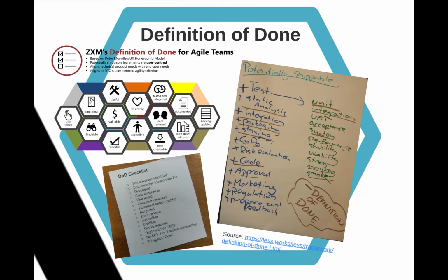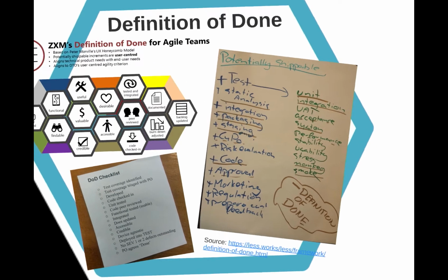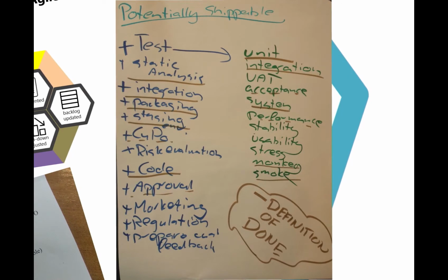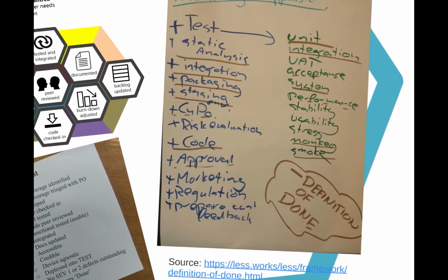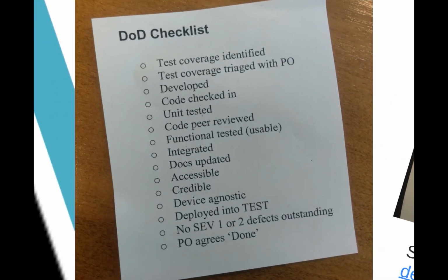Any Scrum teams? Any people from Scrum teams here? Yeah, a few. And this is basically the criteria for stuff to get into that column. There's this one, which I found online, which I thought was a great scribble. It doesn't need to be any more complicated than that. But Kanban requires that those exit and entry criteria are explicit, so that you can have confidence when you're downstream, that when something gets to you, it's met a quality criteria upstream.